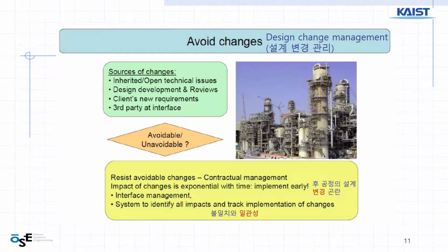So there are so many sources of changes, including technical issues. Technically, there are problems. That is a very fundamental issue. And also there is design development and reviews. There are comments coming from the client, from designers, from vendors, or requests for small changes. Right? And also the client may change their mind so that they have a new requirement.